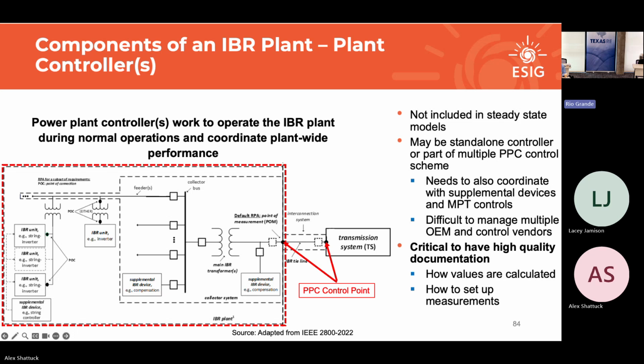So how much would a study like that cost? A controller interaction, just ballpark, just within a single plant. It's not going to be much, maybe 20 grand. And how much revenue do you lose by being curtailed for even half a day? So it's one of those trade-offs, right? Without knowing the context, you could say, well, I'm not doing that extra study, I don't want to pay that engineer 20 grand or whatever, but maybe it saves you millions of dollars, right?